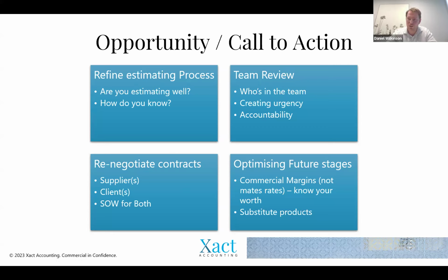Contractors, so suppliers, trades, people, whatever it happens to be, make sure it's really tight. So if you're about to enter into an 18-month build and you don't need the tiler, and again, apologies, I'm picking on tilers, but if you don't need the tiler for 12 months, you want to make sure that the price you're getting now for 15 months time when you need them, that price is bloody locked in.